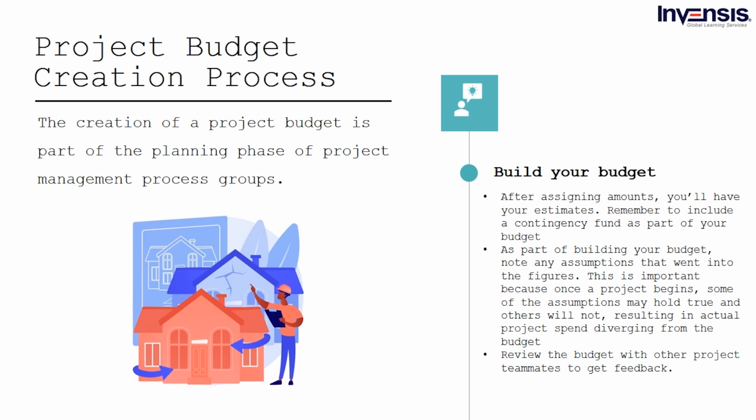If the budget covers a long period, usually more than a month, provide a timetable as well. This makes it possible to identify any recurrent costs in the budget. It also assists you in determining when certain charges will occur.